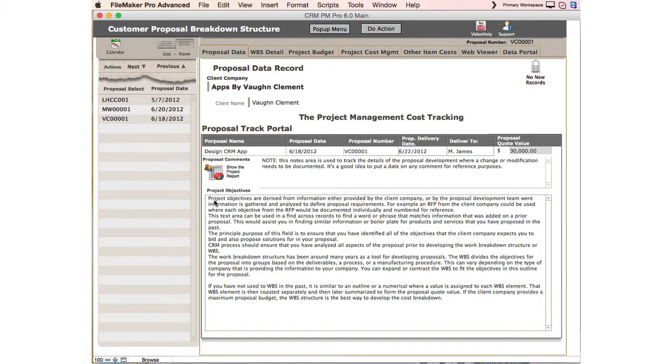Now this is something if you had a client come to you and give you an RFP, you put in all the RFP elements that you have to answer within your proposal, and you would go ahead and mark them up, like if it's 1.0, 1.2, whatever, the way that they created their proposal. It could even be ABC, it could be 1, 2, 3. Whatever the numeric sequence is, put that in there and take the exact requirements, and that's the keyword, requirements, for their proposal that you have to cover in order to meet the requirements that they have.